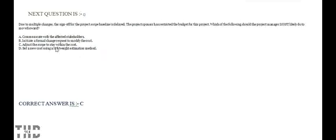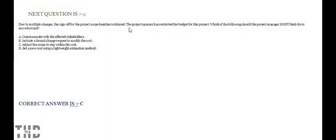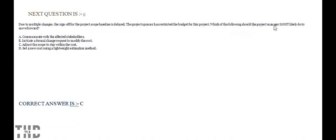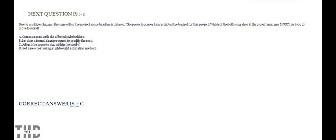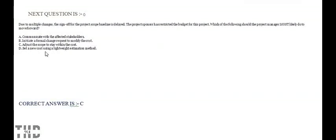Due to multiple changes, the sign-off on the project scope baseline is delayed. The project sponsor has restricted the budget for this project. Which of the following should the project manager most likely do to move forward? Option A: Communicate with the affected stakeholders. Option B: Initiate a formal change request to modify the cost. Option C: Adjust the scope to stay within the cost. Option D: Set a new cost using a lightweight estimation method. Option C is correct.